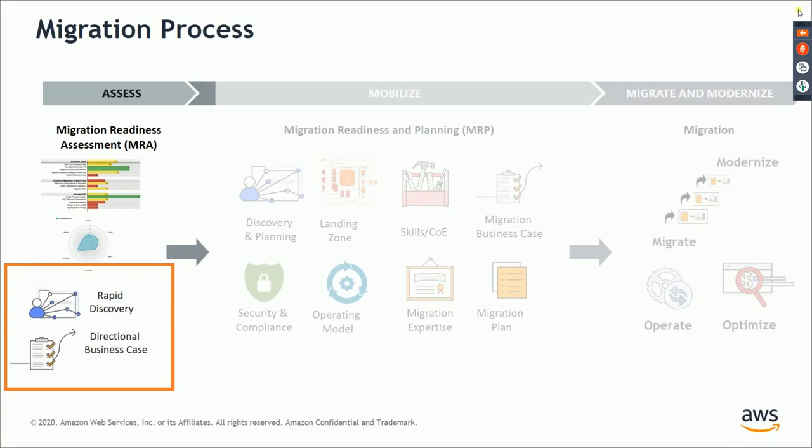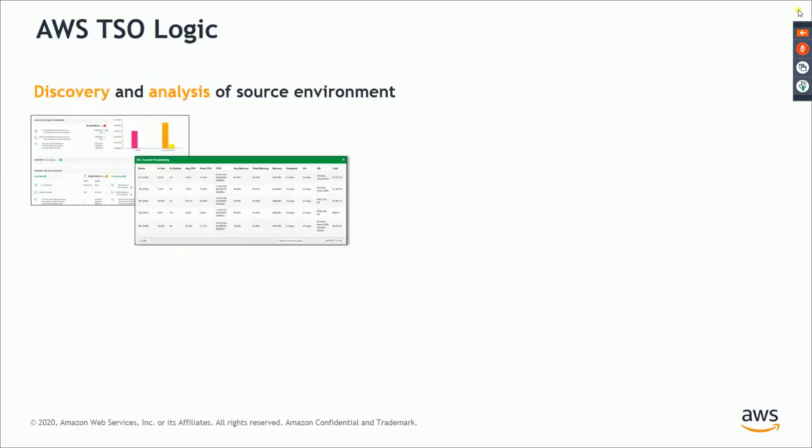However, if the customer is still not convinced, and it is a business case which is going to convince the customer to invest more in the migration process, then we get into the rapid discovery and the directional business case. Rapid discovery basically means that you depend on the high-level data that the customer can provide to you. It might be from their CMDB platform, their asset inventory platform,